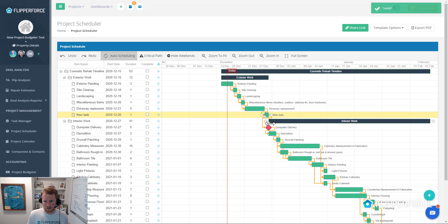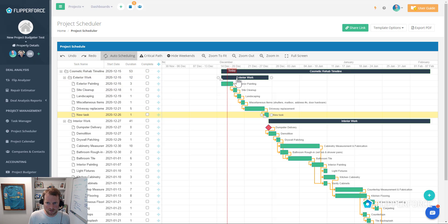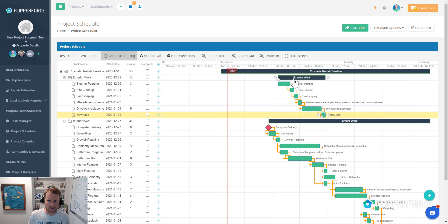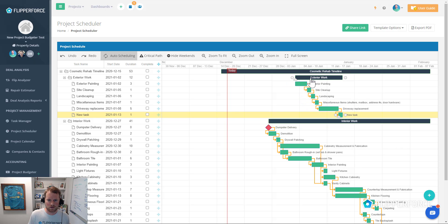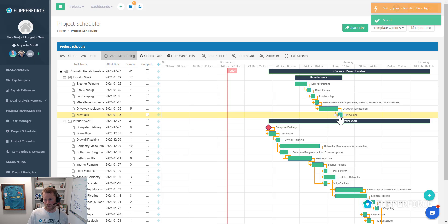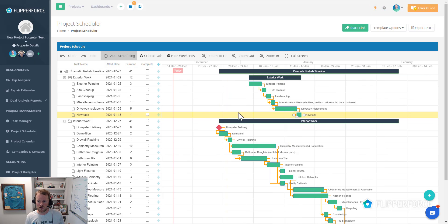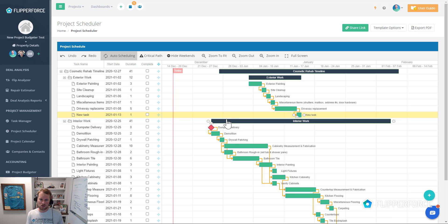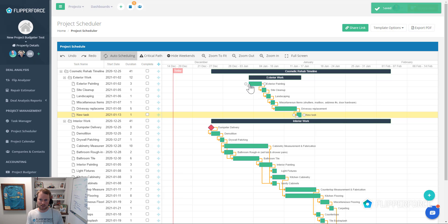Same thing with exterior work — if you wanted to shift it for whatever reason, maybe it's raining or bad weather, maybe exterior work can't start until January 3rd after the holidays, you can drag the entire exterior work group to shift it that way. If you want to move some of these overall project level tasks, you can shift the entire project level task by simply dragging and dropping it. Otherwise, you'll have to change the actual start and completion dates of the underlying subtasks below it.